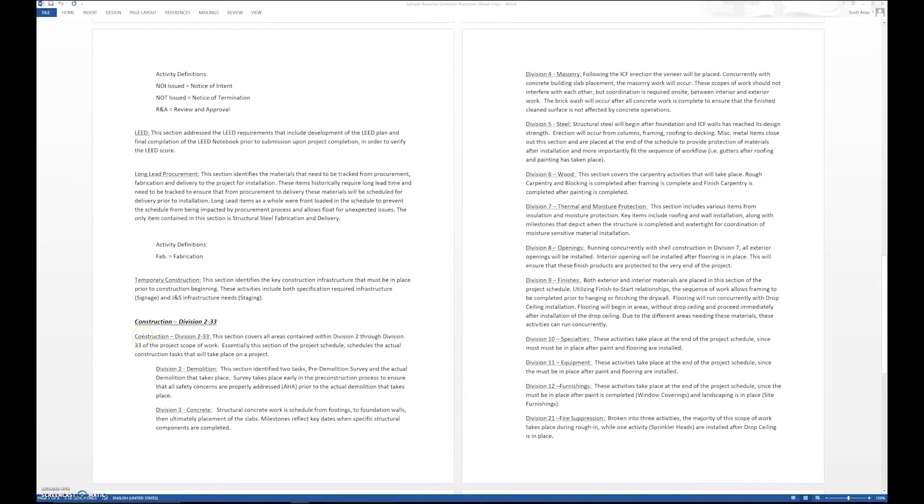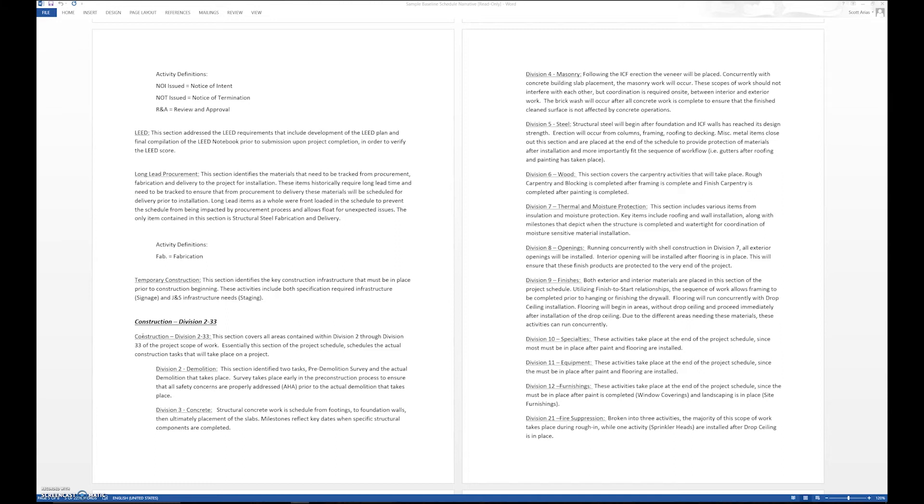Then we get down to the actual Division 2 through 33, and we discuss the individual line items. Like, okay, in Division 2 demolition, what's a summary of the demolition work that is going to occur? Division 8 openings: what's the summary of work that's going to occur for openings? So we do that for each individual section.